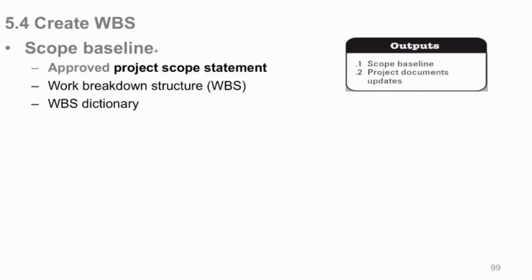Okay, so the work breakdown structure dictionary is the detail of how these people are going to build this thing, that work breakdown activity in the work breakdown structure. So those three things together are your official scope baseline. And once that is baselined, and you do that through change control, say, okay, here's my scope statement, here's my work breakdown, and the dictionary. As of today, this is the approved scope baseline. From then on, that should not change unless something else changes, like your requirements or something.